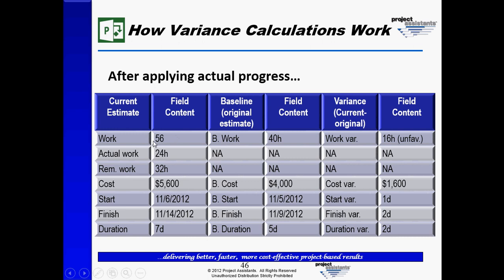In this case, it's a forecasted variance because the task is still in progress. This is now an estimate at completion, but if this estimate holds true, we will in fact end up with an unfavorable variance. This also impacts the cost. The original baseline cost of $4,000 has now been increased to $5,600, generating an unfavorable cost variance of $1,600.